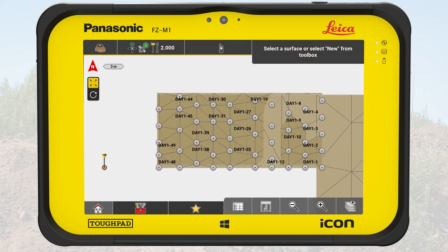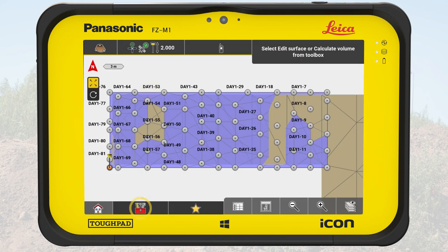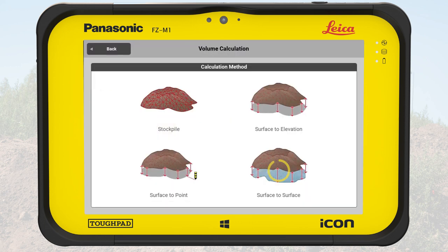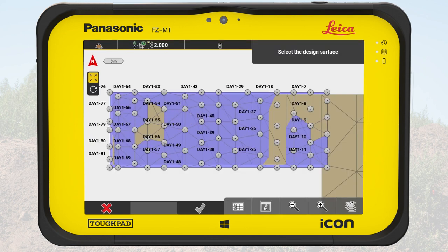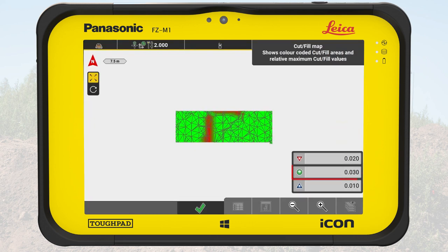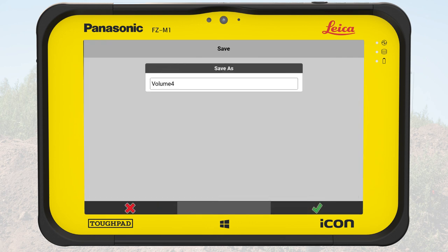We calculate the volume of the new surface against the design file using the method surface to surface. As existing surface, we select the newly measured surface. As a design surface, we choose the imported design file. The volume result on the right side should be close to zero and the cut fill map is mainly green within a set tolerance for this job of 3 cm. We confirm the work of the dozer is done for this part of the parking lot. We go back to the calculation screen, save the calculation and close the work of today.